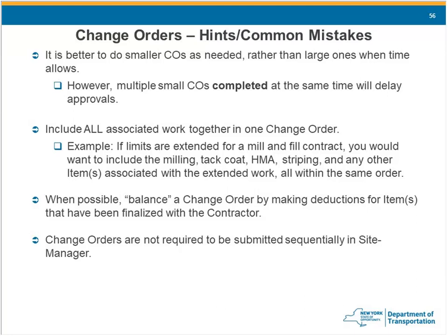And small COs completed at the same time will delay approvals, because each order has to wait 1 week for processing in that OSC system.